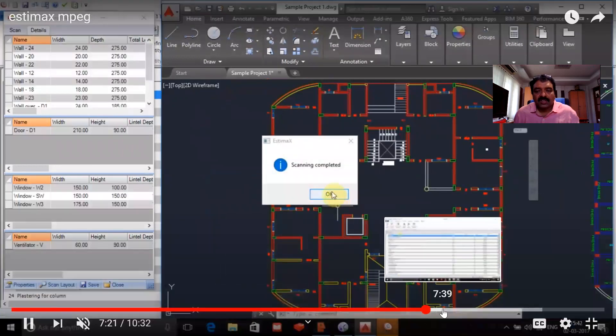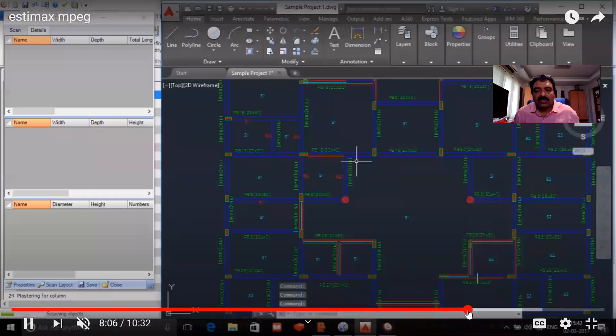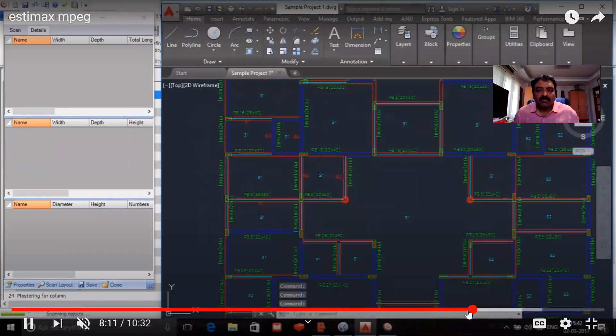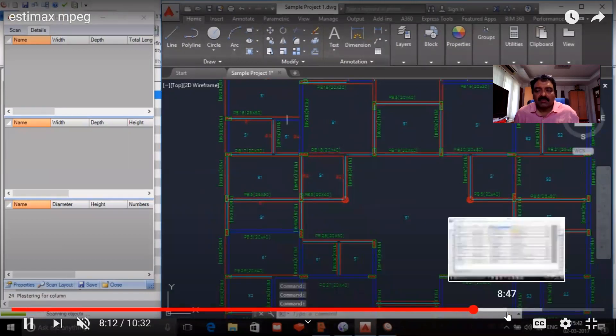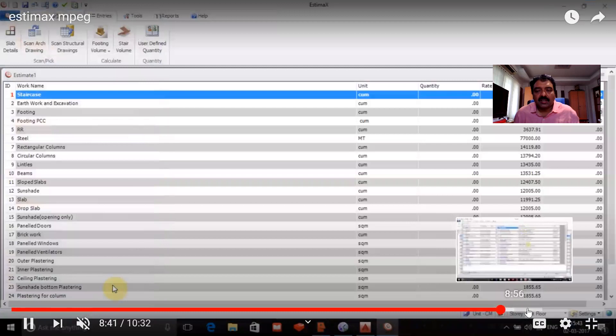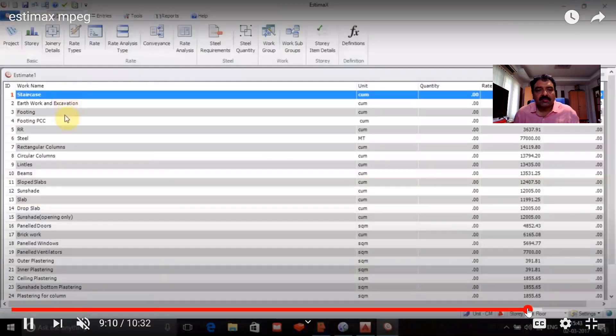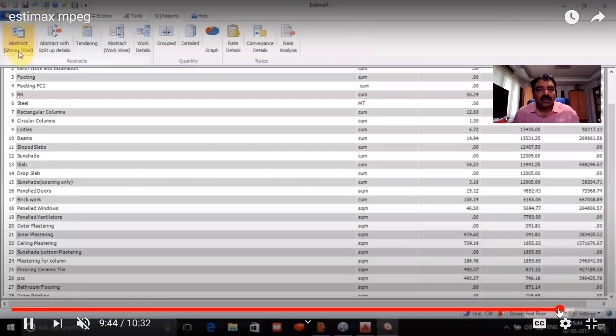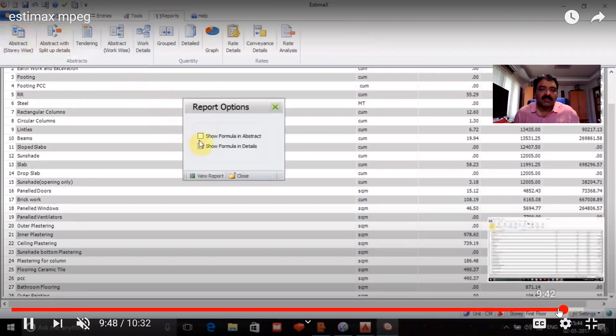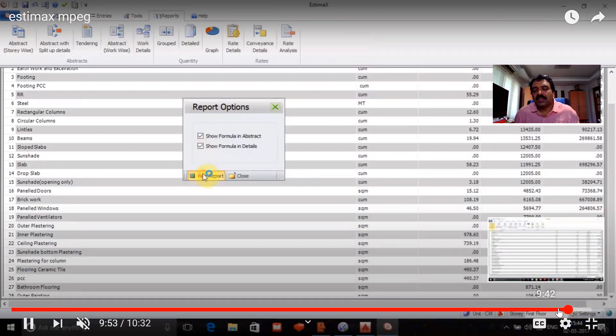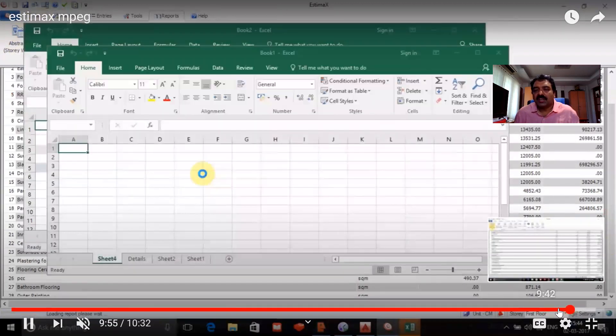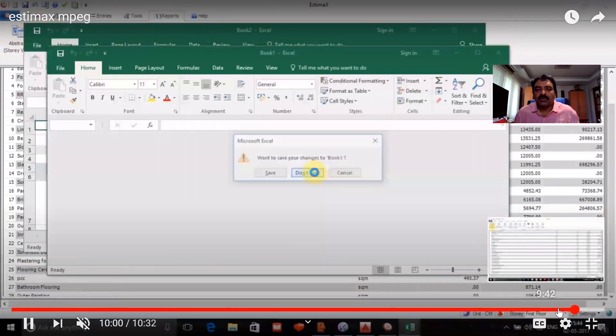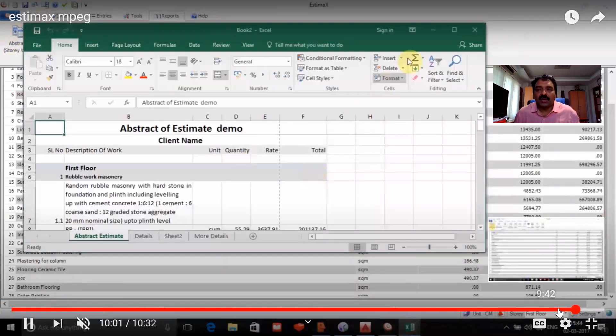So once architectural drawing is completed, you can do the similar thing for a structural drawing. The beam concrete, column concrete, etc. will be scanned. Once these are ready, the system will be able to calculate the quantities automatically and give you a report in an Excel file from the system. The beauty of the connected approach is that this estimation file, which is an electronic document available in Excel, can be exported to your ERP directly.